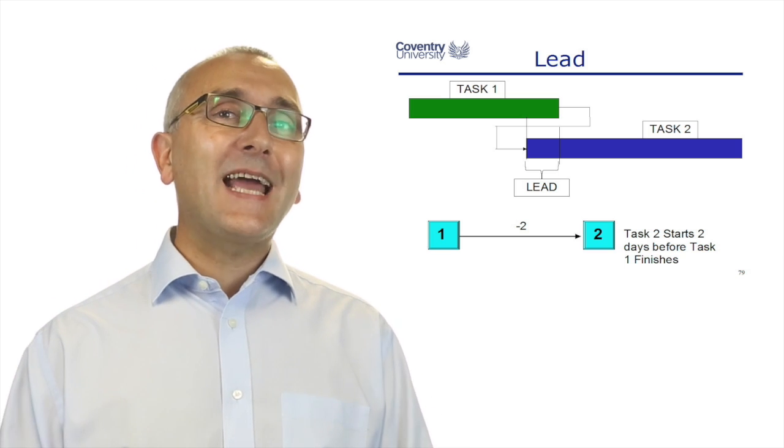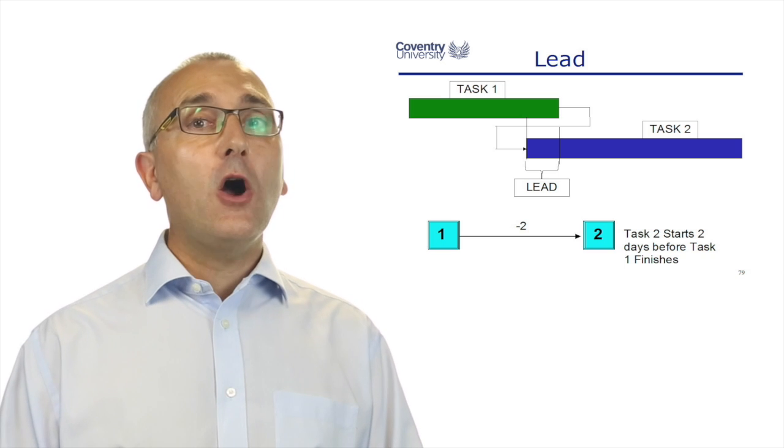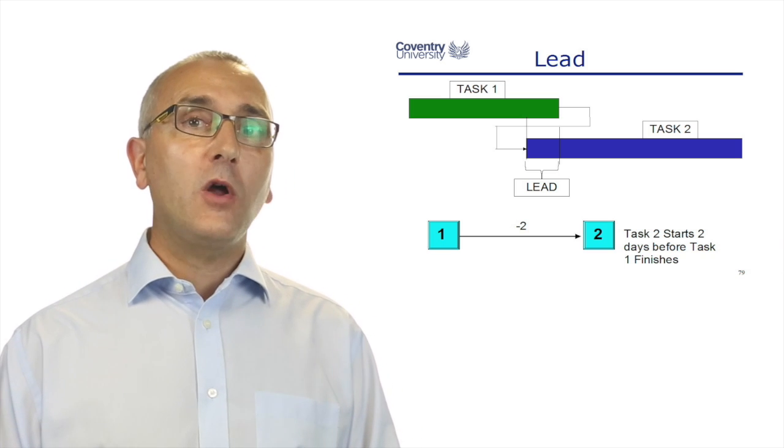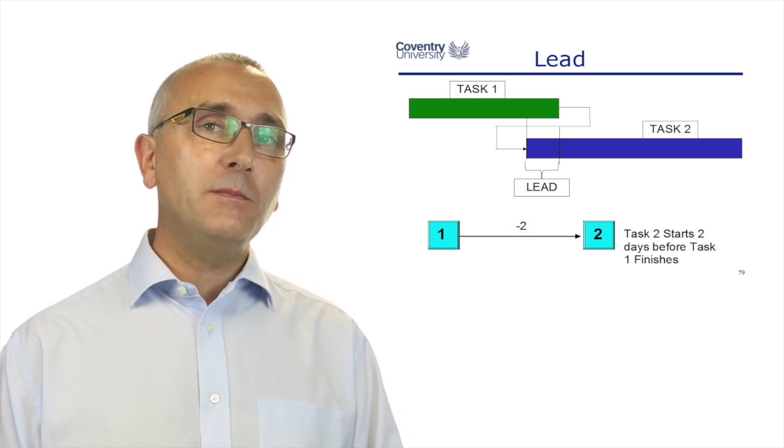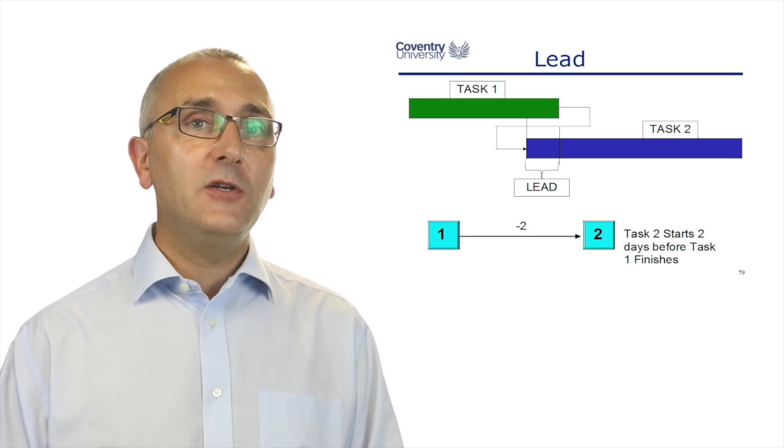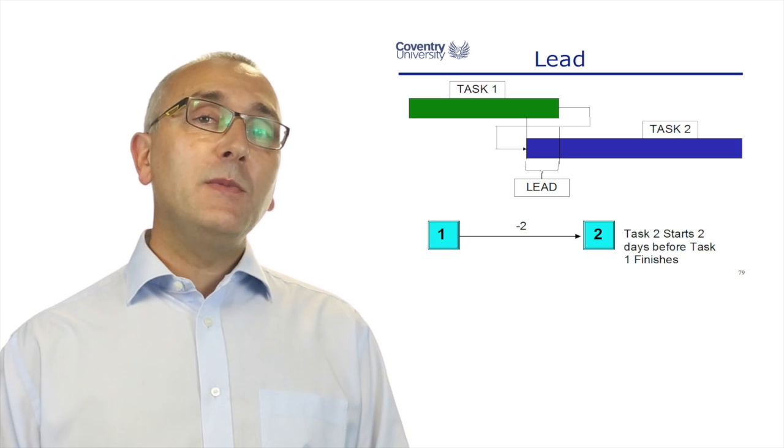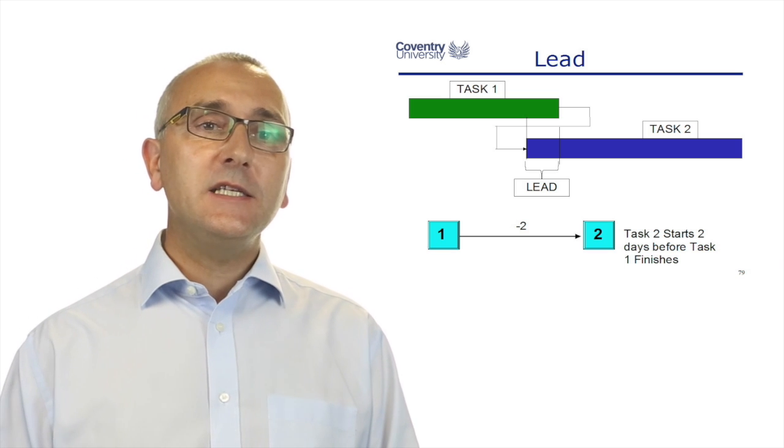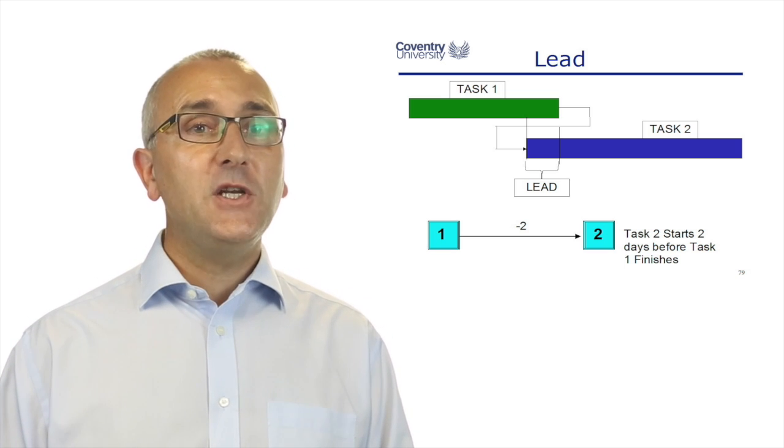On the Gantt bars, on the top of that slide, task two is overlapping with task one by some period of time. On the dependency chart, I've indicated it with a negative number, and this means that task two can start two days before task one finishes.